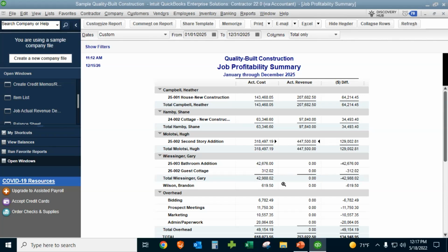And then we'll only need the contract details as it relates to what the contract price is and what your estimated cost for the contract in total is, to get our over under billings adjustments.